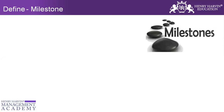For the Control phase, you should give at least two to three months to sustain the improvements. So this is how you should have a start time and end time for each phase.